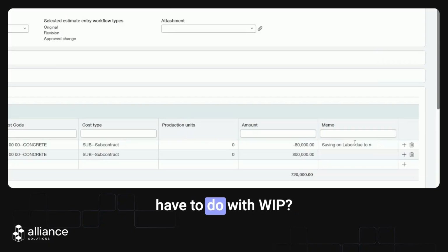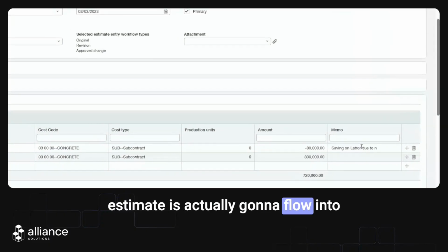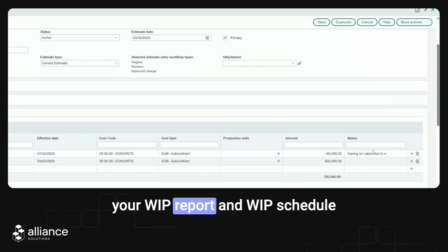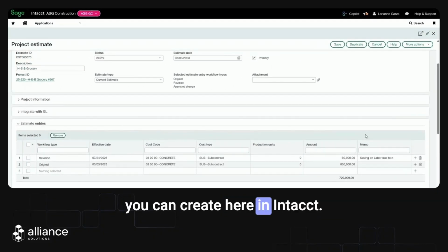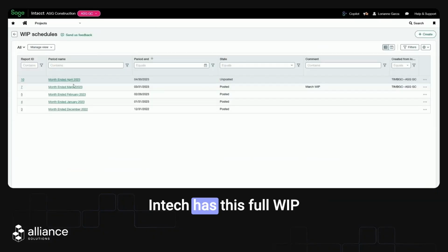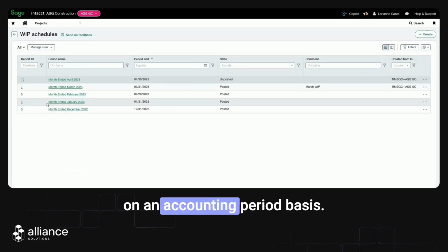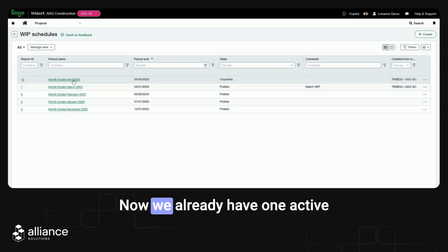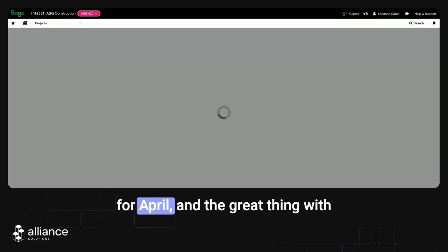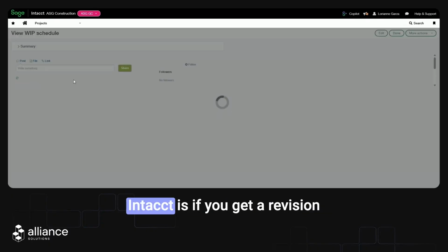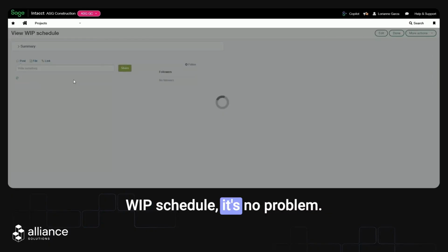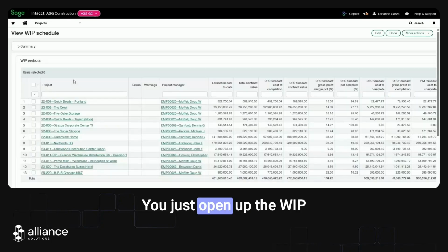Now, what does this have to do with WIP? Well, your revision for your estimate is actually going to flow into your WIP report and your WIP schedule you can create here in Intacct. Intacct has this full WIP management section where you can build out WIP schedules on an accounting period basis. Now, we already have one active for April. And the great thing with Intacct is if you get a revision after you've already created a WIP schedule, it's no problem. You just open up the WIP schedule you've created.